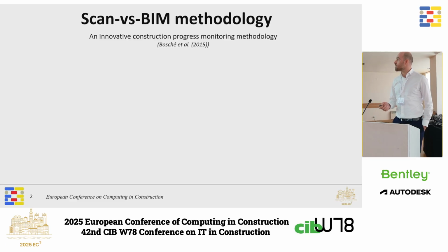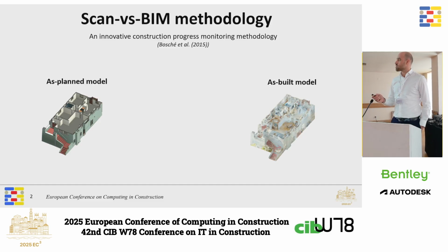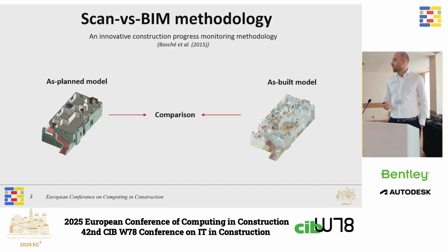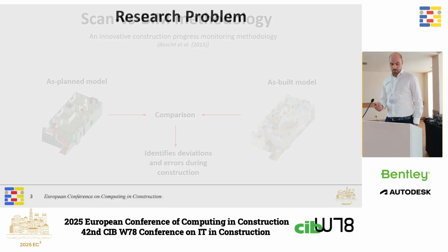We focus here on SCAN-vs-BIM methodology, which is an innovative construction progress monitoring methodology that compares the as-planned and as-built model of a building under construction and identifies deviation and errors during the construction.